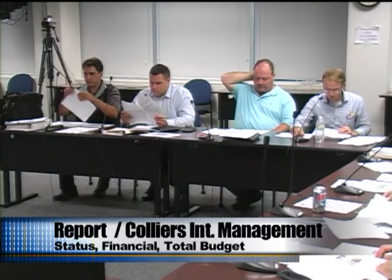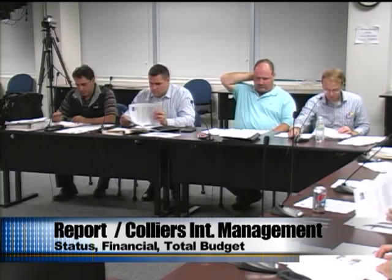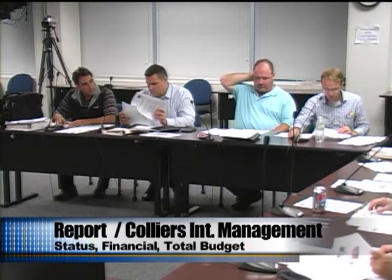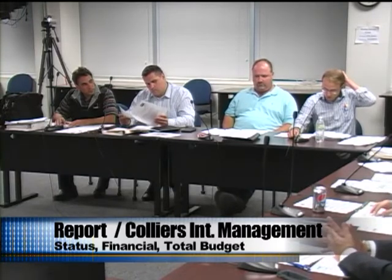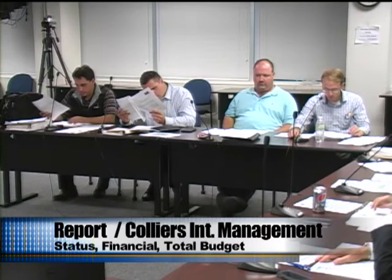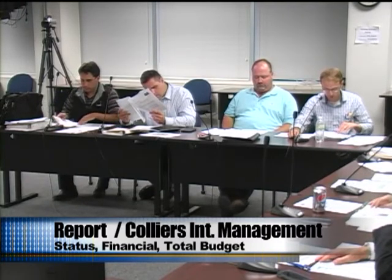In terms of risks, we just heard about the permanent power being turned on, which is going to happen 2 to 3 weeks earlier than everybody anticipated, which is actually going to help the project. We'll be able to vet out the mechanicals and get power to the building, so that's a great thing. We have some RFIs and some other things that have come in related to just how the building gets bolted down to the grade beams that we don't anticipate being a construction schedule conflict or delay, but we just put it in there because we're tracking it and trying to stay on top of it.